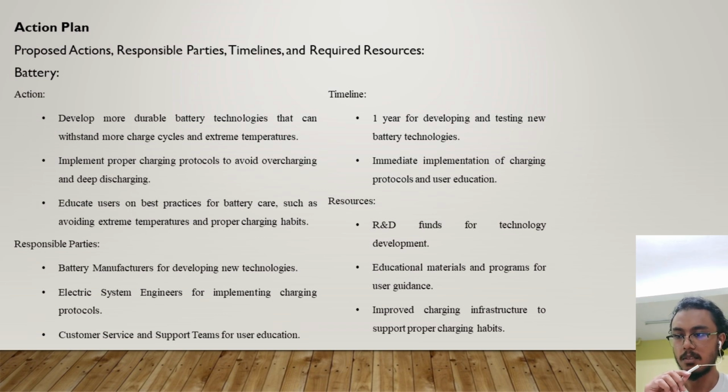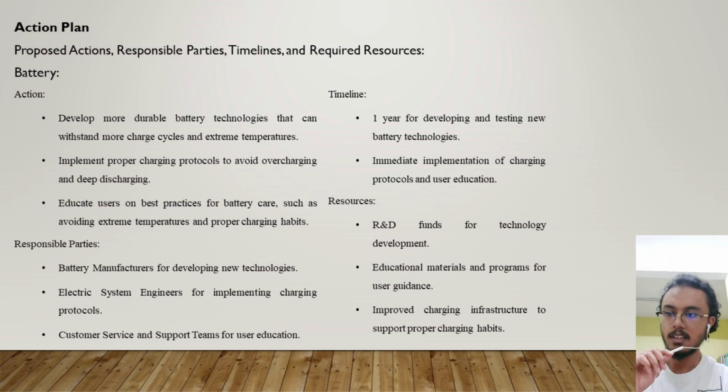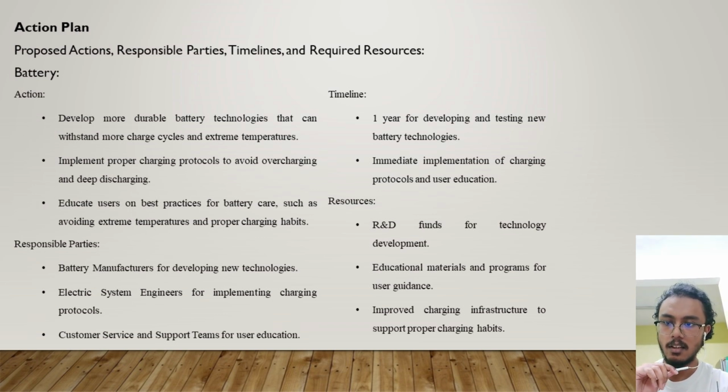The responsible parties here would be the battery manufacturers, electric system engineers, and customer service and support teams, which can provide users with proper education. The timeline for this would be 1 year for developing and testing new battery technologies, and the immediate implementation of charging and user protocols, and this has to be done with immediate effect.